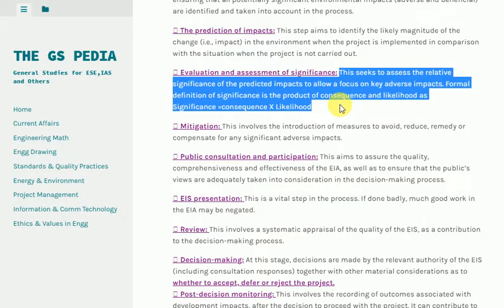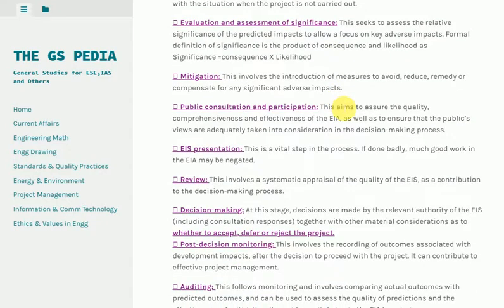Evaluation and Assessment of Significance: This seeks to assess the relative significance of the predicted impacts to allow a focus on key adverse impacts. Formally, significance is defined as the product of consequence and likelihood: Significance = Consequence × Likelihood.